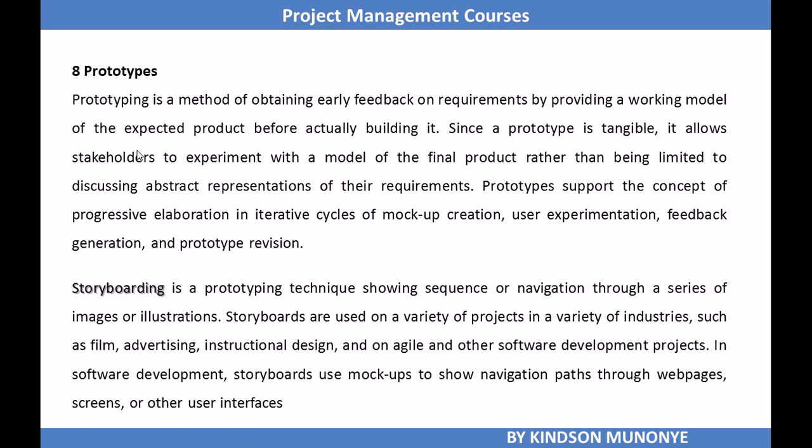Another important tool and technique for collect requirements is prototyping. Prototyping is a method of obtaining early feedback on requirements by providing a working model of the expected product before actually building it. So if you want to build a new design of a car, you might build a prototype, let's say looking like a toy car.